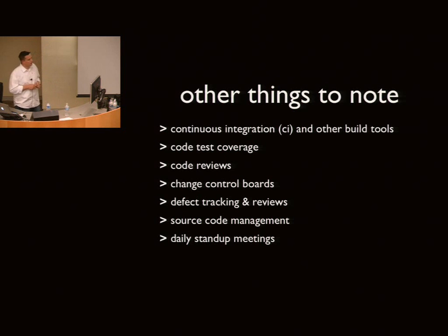The other thing that you want to try to do is have a weekly defect tracking and review meeting. Know all the bugs in your queue. And what took me a long time to get comfortable saying is I'm not going to fix that. It may be a relatively minor issue. It may only affect a small number of people. It just may not be that high of a priority for you. So don't be afraid to push back to the person reporting the bug and just say, hey, I'll put this as a priority 5, on a scale of 1 to whatever, but I'll get to this when I can, right? Don't get caught in the, oh yeah, next week, or next push. They don't like that.